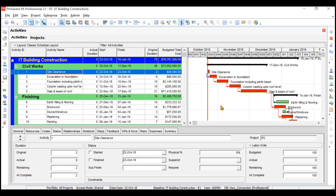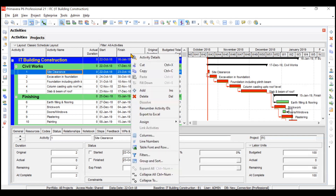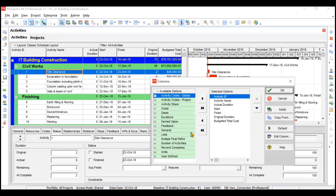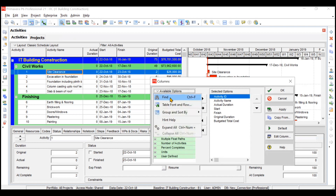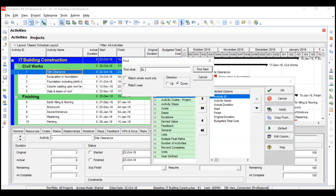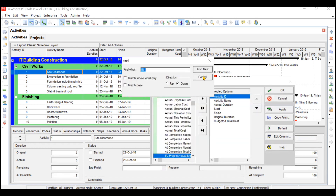Now what needs to be done is you need to customize your activities window by adding a few columns so that you can track your progress and update the status of activities easily. Go to Columns and add options like Actual Start, Actual Finish, then Baseline Start and Baseline Finish. You can directly search from here — type 'BL' and it will direct you to the relevant fields.